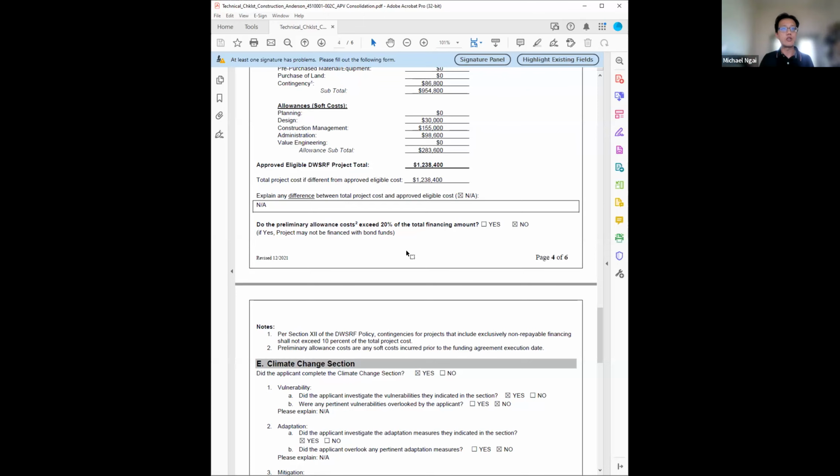We would like to have an initial number. We would like to have all that. So once the project is bid out, and once we have a more solid number, that's when we would go back and really look into, hey, do we need to increase contingency? Maybe we need to increase to 20% because of some reason. So we can adjust at that time. But for the initial estimate or initial agreement, we would like to keep it to, say, 20% for that, 10% for that, and just keep it as basic as possible.